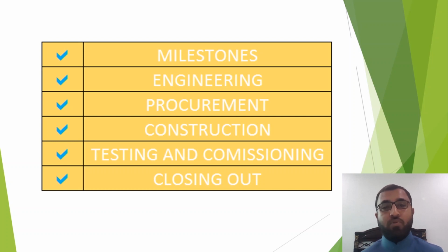When you are going to submit those drawings, when they will give us the approval as per the contract. If it is mentioned in the contract that they need to give us the approval after 14 days, then you need to mention 14 days. Then the construction. The construction is the most important part of your baseline schedule. Here the critical path will be defined.